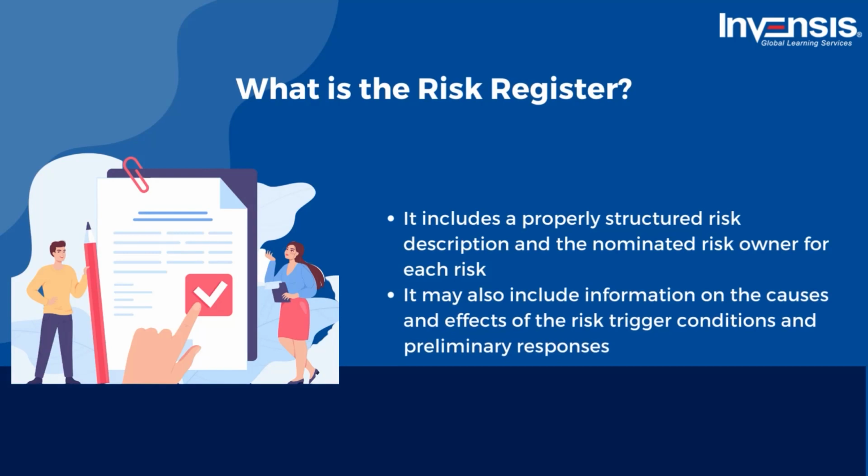So, what is the risk register? It includes a properly structured risk description and the nominated risk owner for each risk. It may also include information on the causes and effects of the risk, trigger conditions, and preliminary responses.